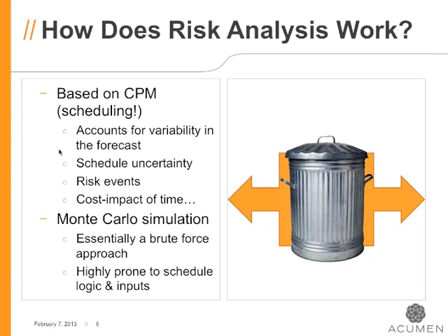First and foremost, a schedule risk analysis should be based on a critical path schedule. In fact, a true schedule risk analysis software tool needs to have a CPM engine as part of the analysis. You can't run schedule risk analysis using the likes of Excel, because a spreadsheet doesn't understand the complexities of calendars and constraints and everything that goes into a CPM tool, whether it's Microsoft Project or Primavera. You need to uphold the rules and the logic that a CPM tool will actually deliver.